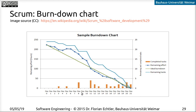Here we have a three-week sprint cycle — 7, 14, 21 days — which is also an option depending on your team preferences. If you have a tool to generate this sort of burn down chart, you can always get a good overview of the progress of the current sprint cycle, just like with the Scrum board. It's not necessary to draw this manually if you don't have a digital tool, but it gives a nice overview, especially in a larger context.